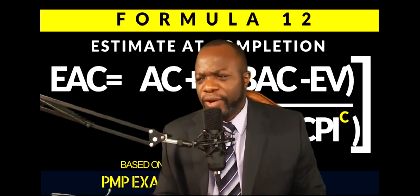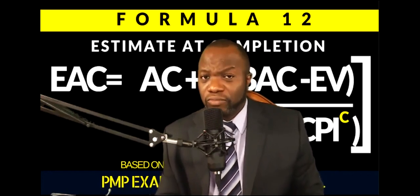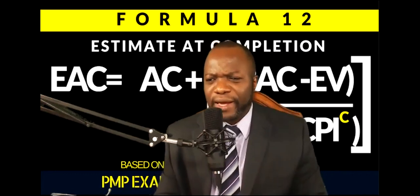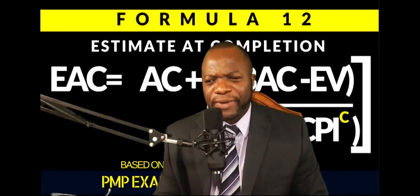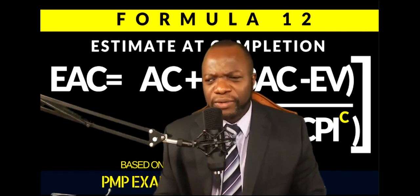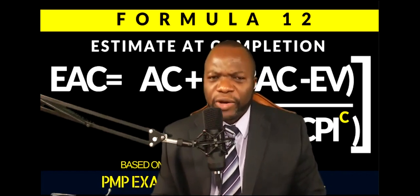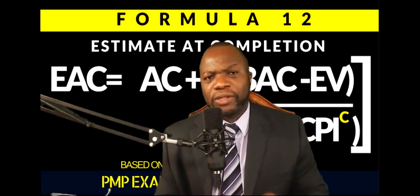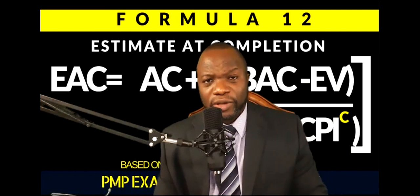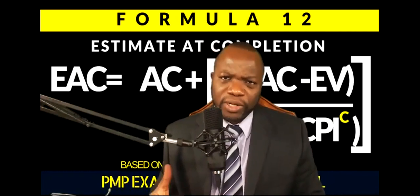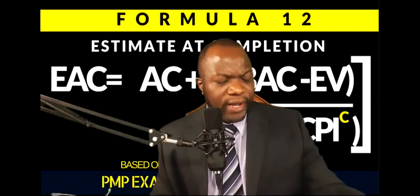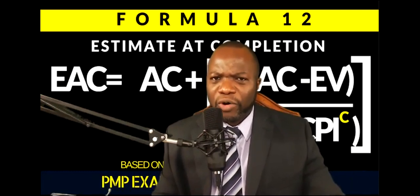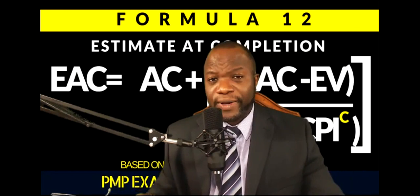What are the disadvantages? It requires a CAM. In those days, we would have control account managers over control accounts, and they would make an assessment of the percent complete for the milestones. And it requires a little bit more work because you've got a double whammy. You've got the milestone weighting, and then you've got the percent complete on top of that. But nonetheless, it is a great way of keeping track of your project in a more organized fashion than just throwing out a number.